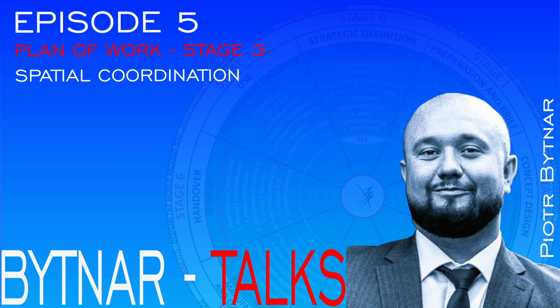There may be some outstanding things to consider later on, but this may be putting conditions in the planning process. So not everything has to be ironed out. There may be some wiggle area when you go out and submit your planning application, but most of it, especially the important stuff as fire, structure, the architectural concept, they all should be approved and coordinated and put through to planning permission.